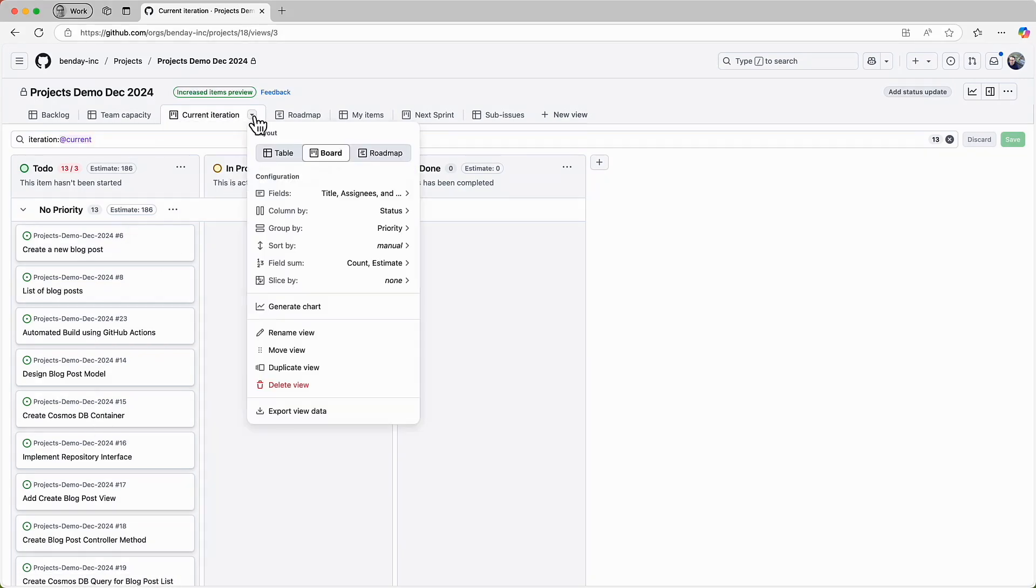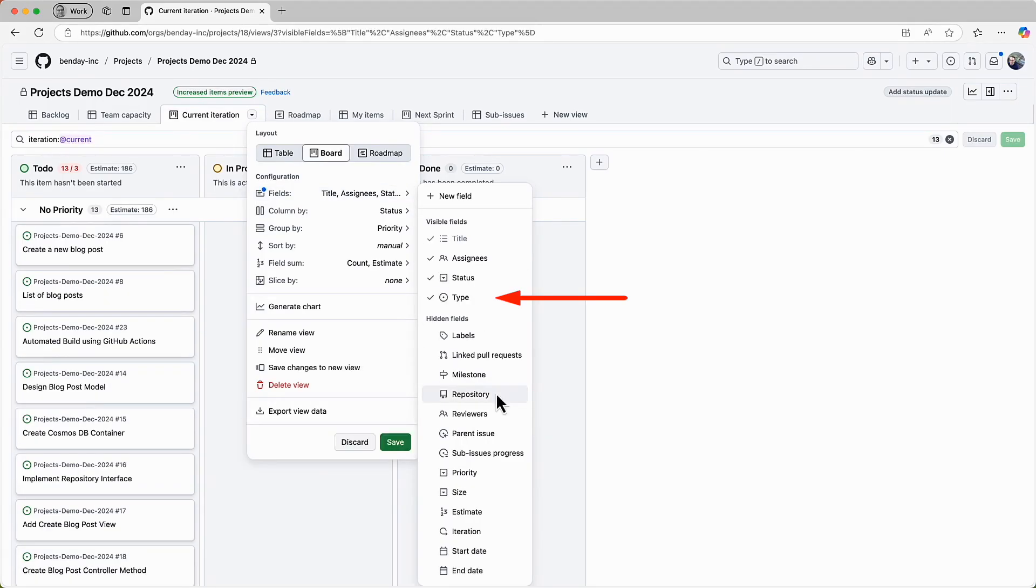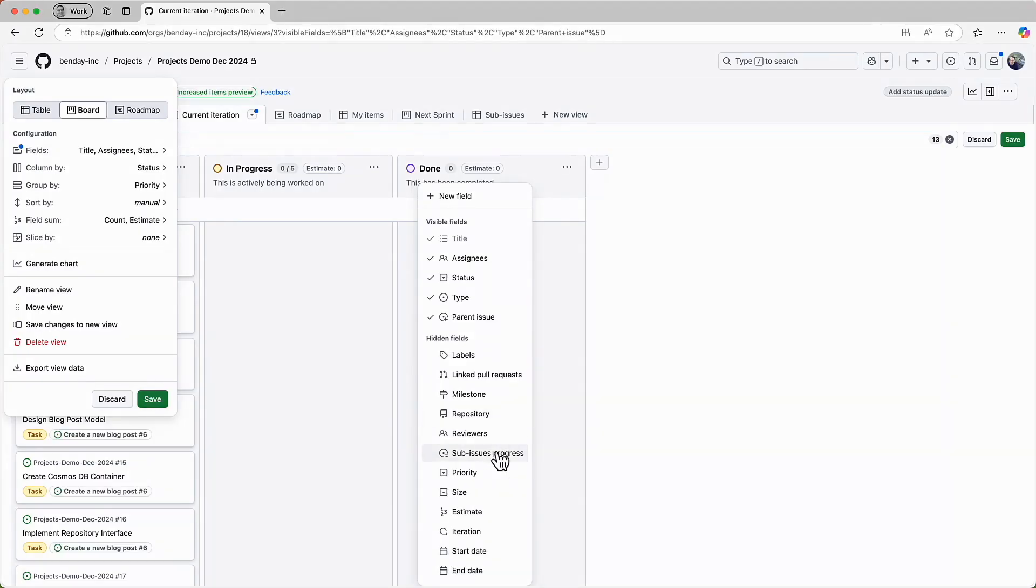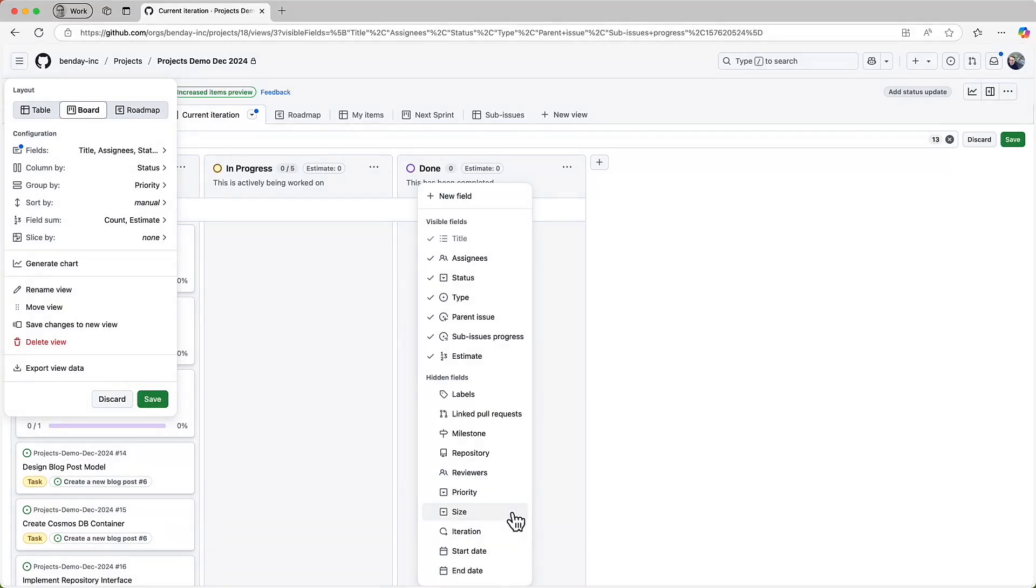Bring up the customization menu, and then let's modify the fields that are displayed. The first field I want to add is issue type, that's displayed in this list as just type. Select that field and that adds it to the visible fields list. And then next we're going to want to display the parent issue value, then the sub issues progress field, and then finally I'll add the estimate field. I want to stress that I'm adding the estimate field and not the size field. I cover why in a previous video, but the short form is that I don't think the size field is going to be very useful for most scrum based teams.